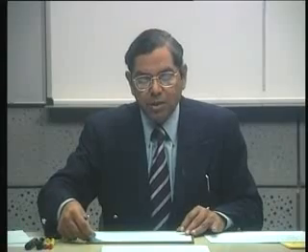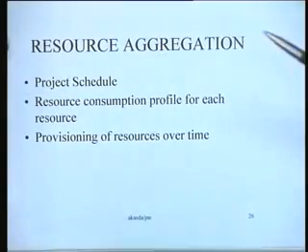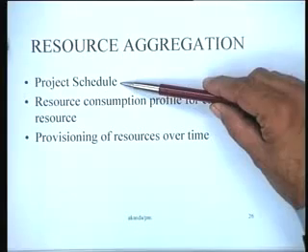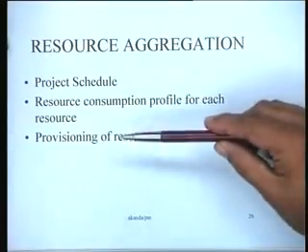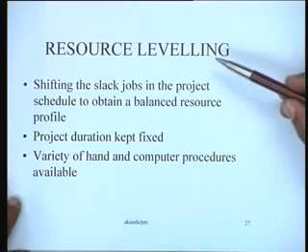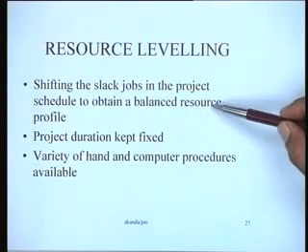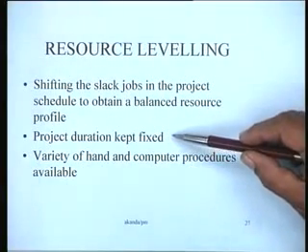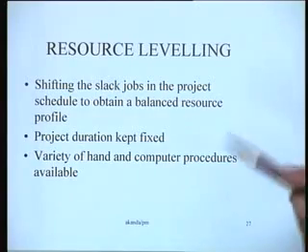Then I would like to just talk about some aspects of resources specifically. We can talk about resource aggregation, which talks about determining the project schedule, resource consumption profile for each resource, provisioning of resources over time, basically aggregating all the resources so that you know what is the total resource requirement, and then the process of leveling these resources by shifting the jobs which have slack to obtain a balanced resource profile, keeping the project duration fixed. And there are a variety of hand and computer procedures available, which we will be discussing as we go along in this particular course.